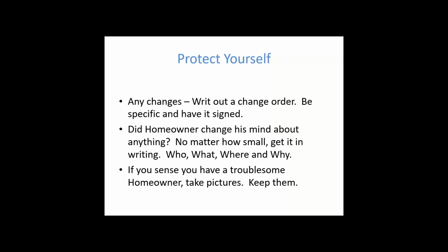So after the installer installed the home, the homeowner came back and said all of the drips and leaks coming down from the ceiling, where she had tried to use some sort of cleaner to clean tobacco off the walls, were the result of the installer not legging the roof on correctly, and therefore those stains were the installer's responsibility to correct, and not the homeowner's who actually created the disaster. So if you see something like that, take a picture, note the date, and make notes that this is the way the home came in and not the result of the actual set.